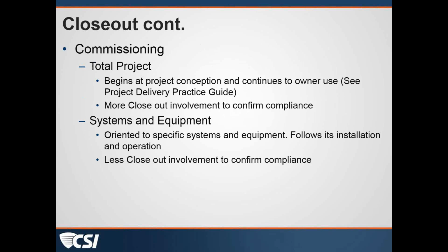Well, what we ask for is for the contractor to take our construction set and mark in that set any changes that occur during the course of construction. So what I expect to get back is the whole construction set, not just two or three sheets and him saying that, well, these are the only sheets that changed. I want the whole set back marked up.